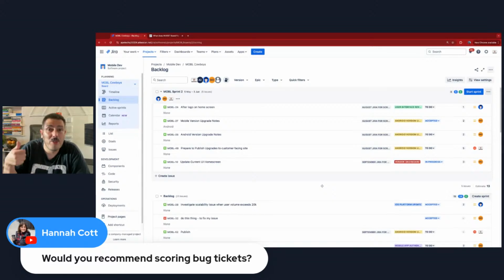You want to have steps to reproduce for each bug, because when you understand what caused the bug, where it was found, what caused it to be found, and all the environment variables that were applicable to the bug, then your team can estimate a little bit more accurately, because they can go, oh, I see. I know how they created those bugs.